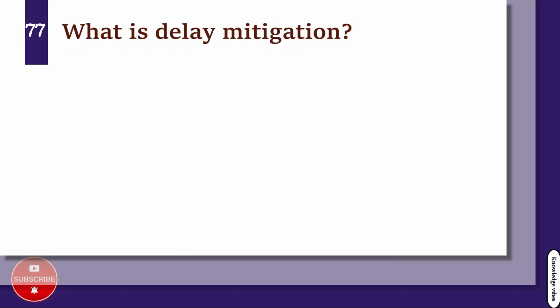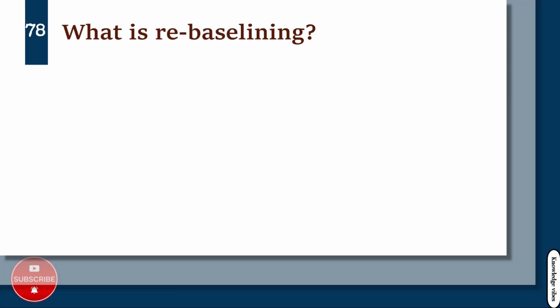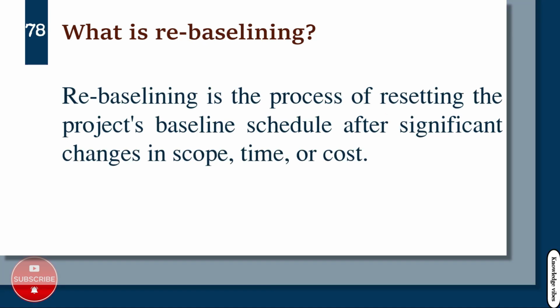What is delay mitigation? It involves taking corrective actions to reduce the impact of a delay and bring the project back on track. What is rebaselining? Rebaselining is the process of resetting the project's baseline schedule after significant changes in scope, time, or cost.